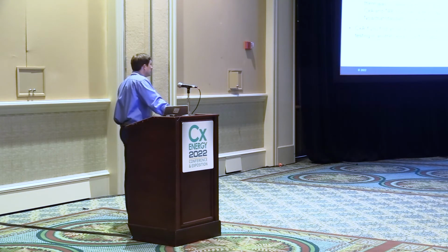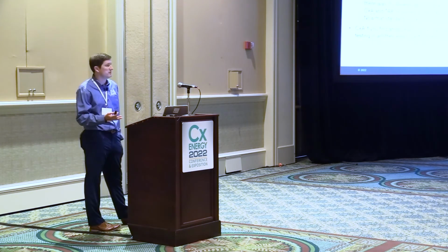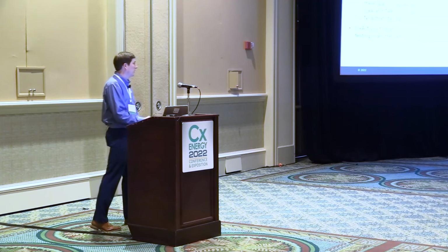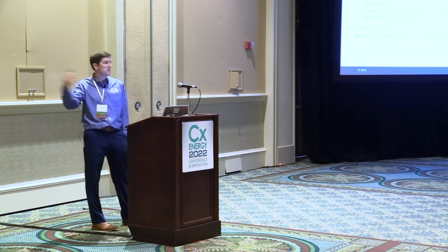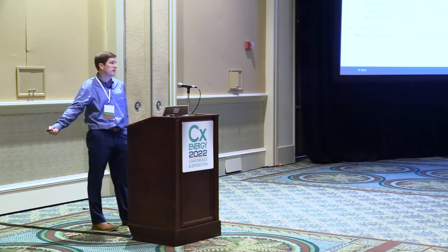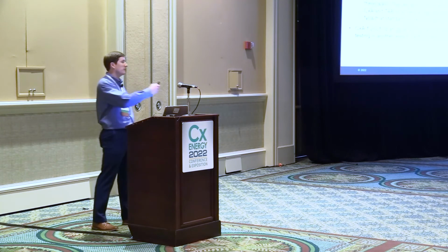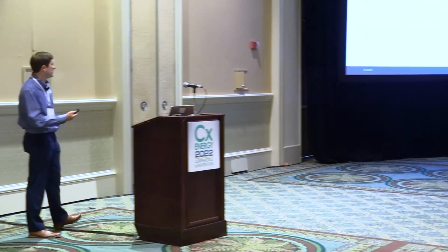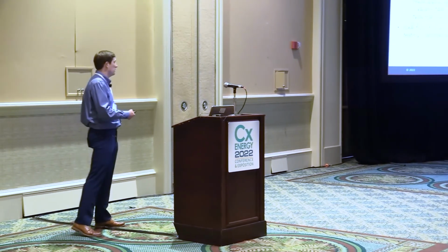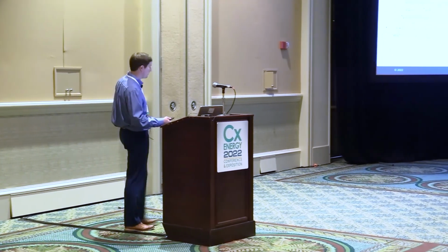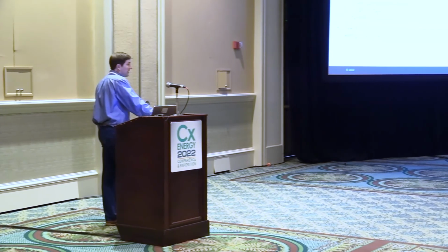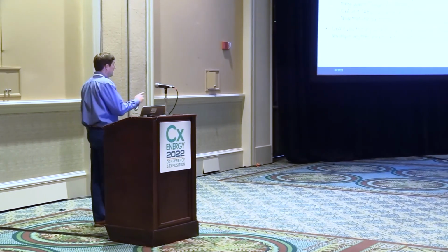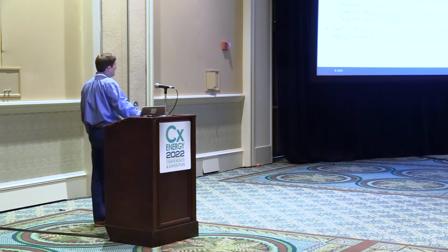Also, which I think is interesting, CxA, if you find an issue during L4 in an area, let us know, because we could be in another area doing L3, having the run of the place and getting to do what we want with the system. So if you find something at L4, let us know, as we will gladly perform that test to make sure whether it's an individual unique issue or something that's going to be a consistent issue.